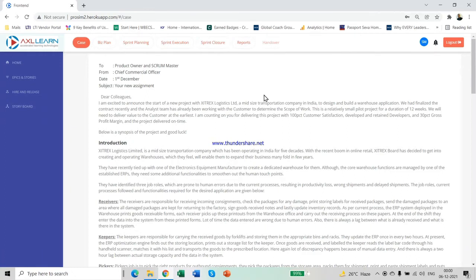It's time to start the first sprint. The first event of a sprint is the sprint planning meeting. As mentioned in the Scrum Guide, the sprint planning participants include the product owner, dev team, and the Scrum Master. The input to this meeting is a prioritized product backlog.